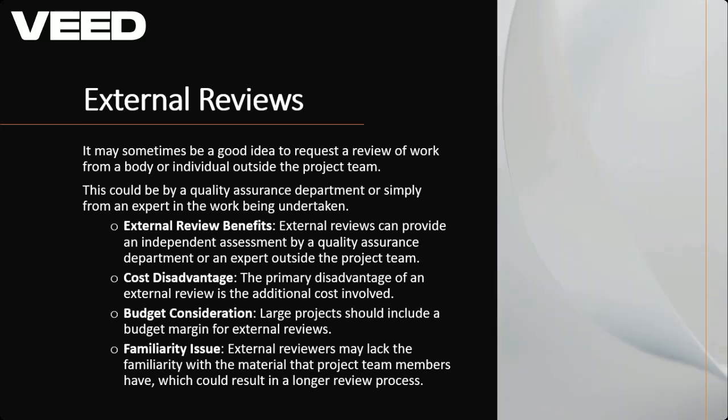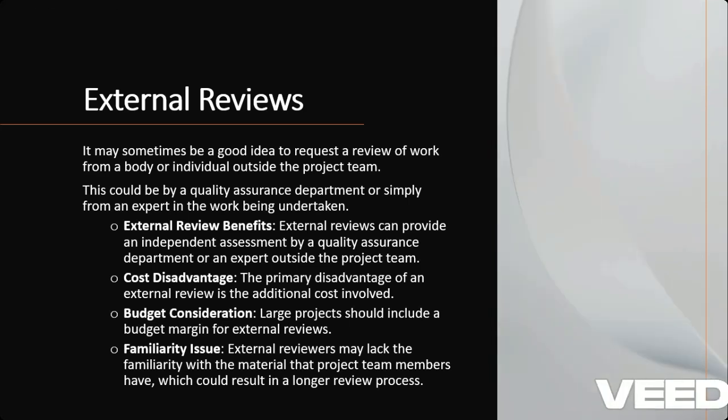The major disadvantage of this is that of course it is expensive. If it's a consultant, there are consultancy costs, expenses, accommodation and so on. If it's an organization, also the same. But on a large project, ideally there should be a provision for quality management, meaning you budget. So if the plan is to have an external review, how much will it cost? If it's a consultant, that should be part of the project budget. So that's why the major disadvantage is that it is expensive.